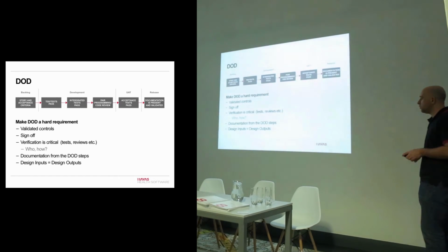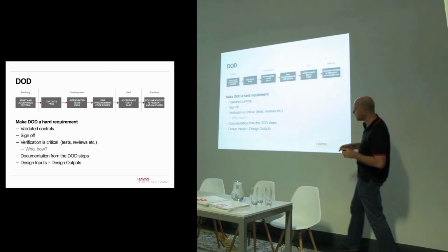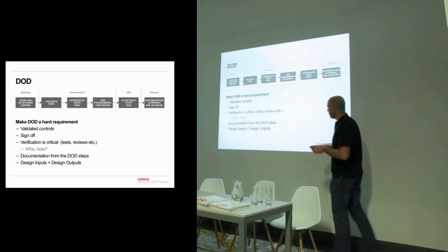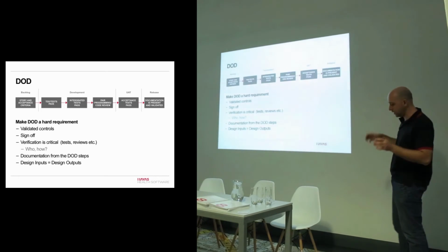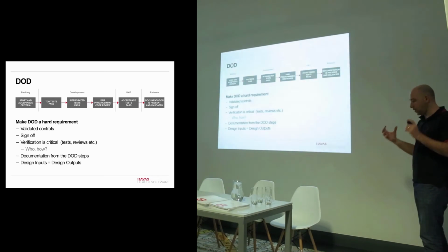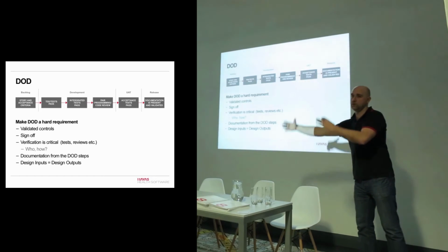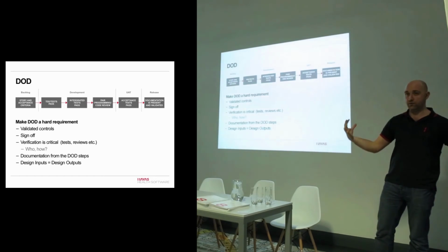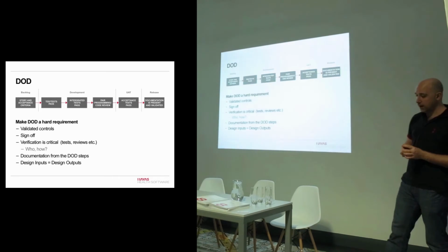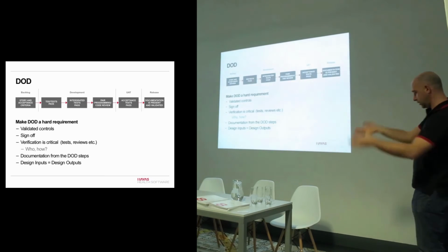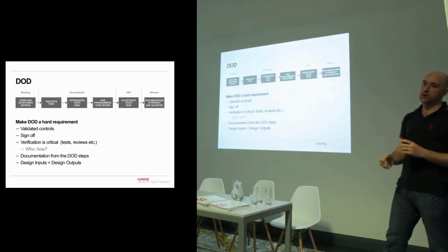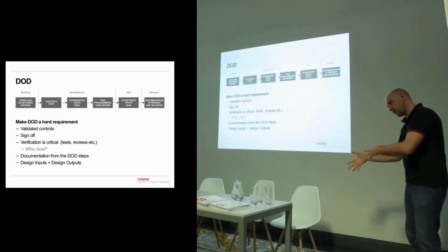What's really important, and the standard, TR 45, talks a lot about this, is inputs and outputs. How can you prove that your design inputs, which could be your requirements and your acceptance tests, equate to what the end product is, what this final piece of software will be? It's no good saying, here's my product, you've got to prove it. You prove it by saying, here's the code, I can align my code to my requirements, I can show that I've done a code review on that code, who did it, when they did it, and what the outcome of that code review was.